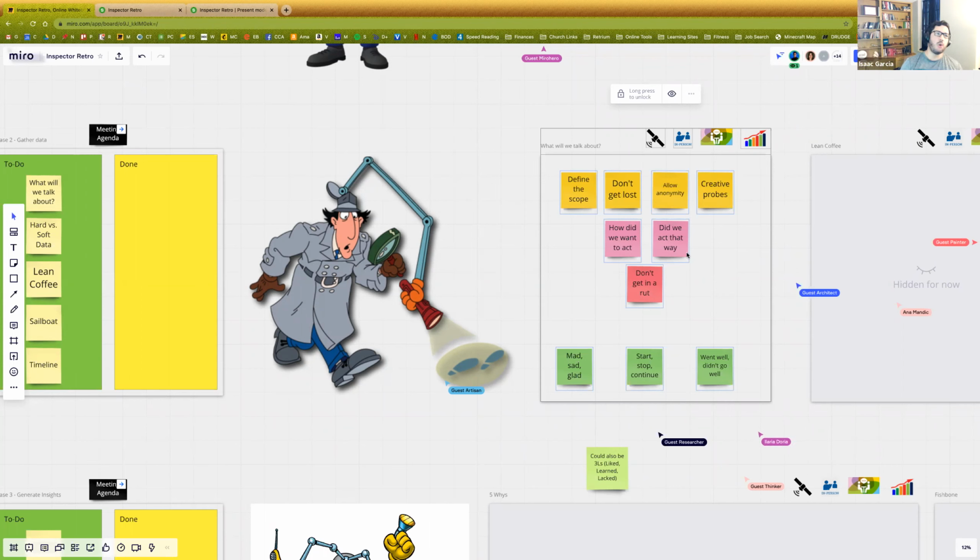If the team says, we always want to be nice to our customers, when the customer calls, we always want to answer and say hello on the phone and be very friendly, that's great. So capture that in a future retrospective. Say, hey guys, did we say hello every time we answered the phone in a friendly way? You want to make sure that the team is finding things that they can track and measure going forward.